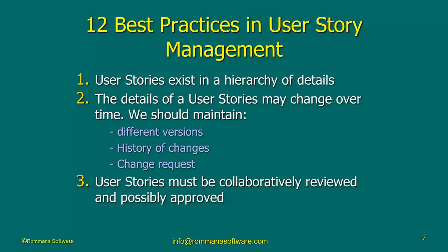So at some point of time, a user story must be approved before we go on with it. And it must be approved by certain people who actually have the authority to approve it or not. And once approved, it can't change. This is good change management practice. And I have to tell you that I have not seen this approval process in most Agile projects that I've seen. I want you to tell me if your project actually has this or not. Many of you who are running a simple Agile project are going to tell me that approval or not approval is going to be an overkill to our project. I don't think we need to deal with that. Sure, maybe for your project, but for many other projects, it is required.